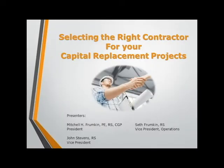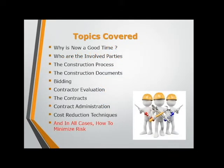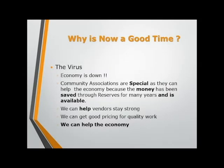So I wanted to mention that about mechanical equipment, because a lot of people, when they look at their replacements and they're doing construction projects and they're making a reason, it's not always because the useful life of that component is over. If, let's say, a mechanical piece of equipment is using a huge amount of energy, there are very nice incentives in the state of New Jersey to get energy efficiency upgrade cost offsets, so maybe it's time to upgrade mechanical equipment, because the cost of the replacement and the cost of the energy can go down significantly if you add them together.